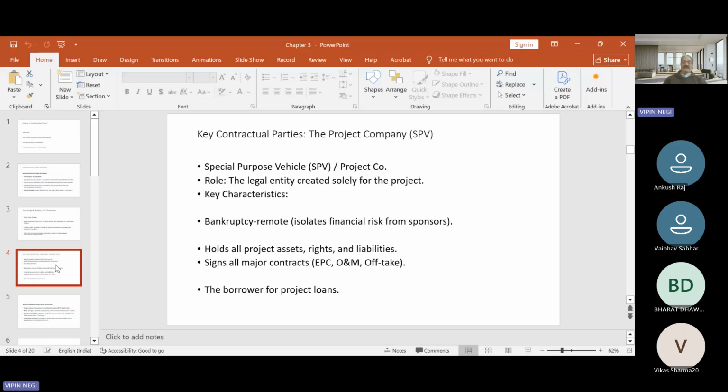For example, supply of coal for thermal power plants has to be tied up with Coal India. And then if the power plant is not located in the vicinity, transportation of coal also needs to be arranged. There are examples of many power plants in India that have faced delays in starting production. The reason is that supplies of inputs were not tied up on time, and as many as six gas-based power plants, including those operated by Lanco and GVK, with a combined capacity of more than 2000 megawatts in Andhra Pradesh, stopped operation in 2013 due to shortage of gas.